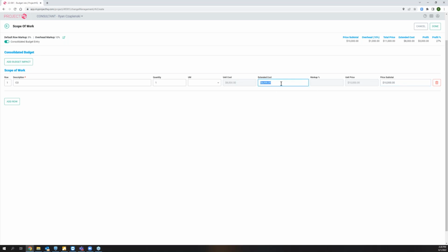Then what I would do is take, so where the math works out here, so my 8 grand is my cost, 10 grand is my change to the contract. That's what the customer GC is going to approve. We take this 10 grand and we mark it up that 10% for overhead. So 10,000 times 10%, add that all up, gives us 11,000. So it's an $11,000 change order that's going to cost me 8 grand, making good profit on that.